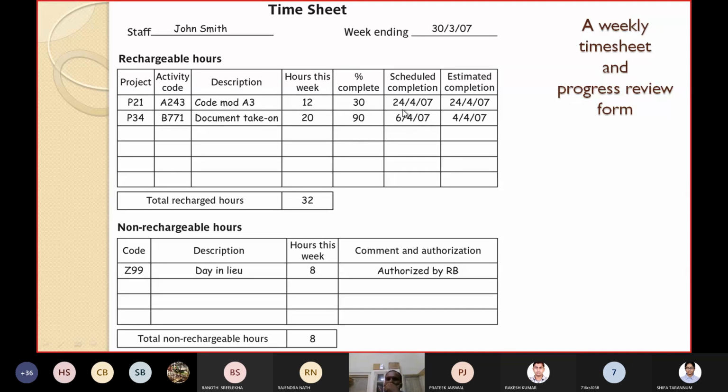How will you compensate for those 2 days? You have to think as a project manager whether you will bring more manpower from the non-critical tasks to this, or you will hire additional manpower, or you will tell the existing persons to do overtime. Because there is a clear picture that 2 days are expected to be delayed, accordingly you have to take corrective measures.